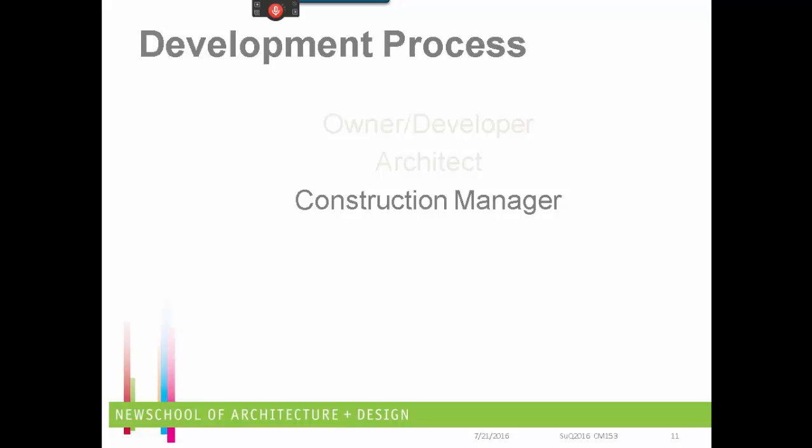Plus, you need to be aware that in the construction project, most mortgage lenders do not want to own a project that is under construction. So most mortgage commitments will be, we will commit to loan you X number of dollars, 60, 65, 70, 75% of the cost of the development, once the project is complete and the certificate of occupancy has been issued. Which means that the mortgage lender is one element that you work with, but you'll also be working with a construction lender who will work on what essentially is the working capital of the project that will be funding the interim construction on a month-by-month basis as the construction manager approves and the architect releases funds to the constructor. So the lender is an important player in here.